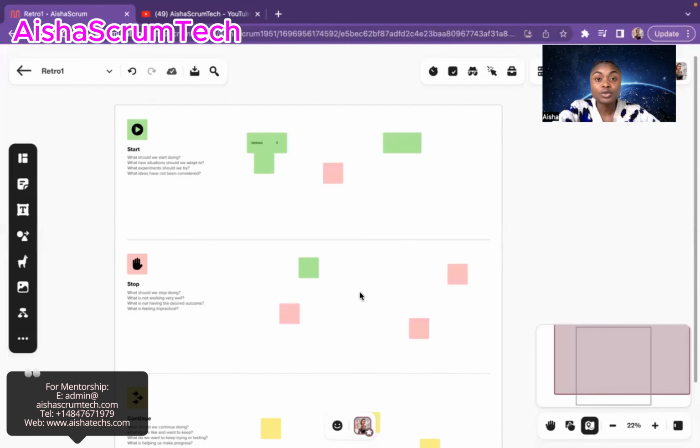That's important. So another thing when it comes to an action item, it is very important for us to always coach the team to vote on an action item that they themselves can work on, right? Not an action item about an access issue, because sometimes those can affect the sprint, right? Where they are having issues with access or they have a networking issue and all of that, then that led to them being unable to complete the task. That's okay. That's what happened in what didn't go well. But when it comes to action items, that's not something that we can improve on, right?